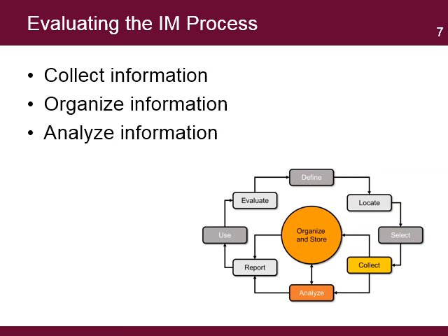Evaluate the process to collect information. Is the volume of information too large to manage? Are the methods and techniques to collect information still valid? And is there a need to change the frequency, format, and responsibilities to collect information? Evaluate the process to organize and store the information. Is there a need to change the methods and tools to organize and store information? And has the security of information been compromised in any way or format? And evaluate the process to analyze the information. Does the analysis provide meaningful information?